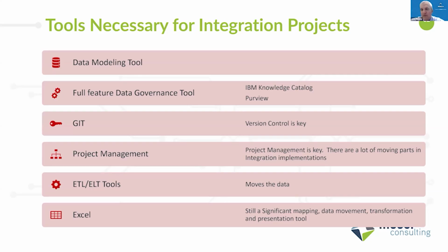And we did that between January 7th of 2011 and July 20th of 2011. Right. So it took us 7 months, 6.5 months to get that sort of application done in a data model. We did all of the mapping in Excel. We built the technical architecture in the first quarter. The second quarter, we finished the mapping and did the business modeling. That took about 3 weeks. The atomic model took about 2 weeks, and we did the dimensional model at the same time, right? And then we spent the other 5 or 6 weeks in the source to target, and the target source mapping is rich, and our QA went pretty well.